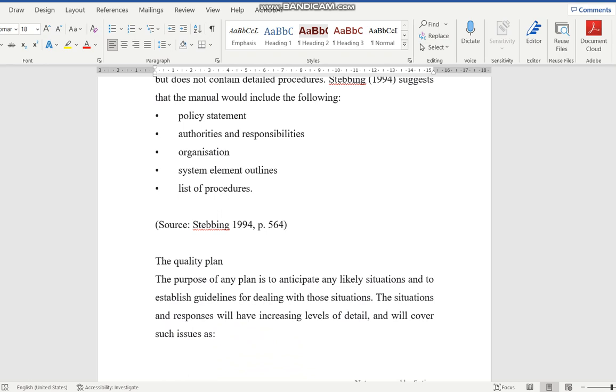It's like if you go on leave, for example, as a project manager, at least your engineers can read the particular manual, and then they can proceed to carry out the checking or the monitoring, and they understand that this is not meeting the requirement, this is the limit, these are the cut-off points for this particular work. We cannot make it less than 10 mm, plus or minus 0.1, so they know the direction. So the manual is a very important document. It is basically your quality plan. And your quality plan, I think I'll stop here and then I'll move on to the other 10 minutes.